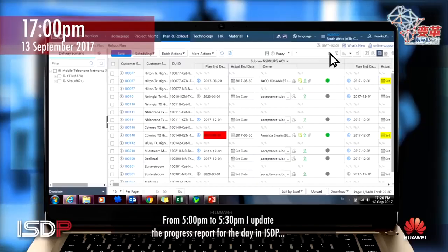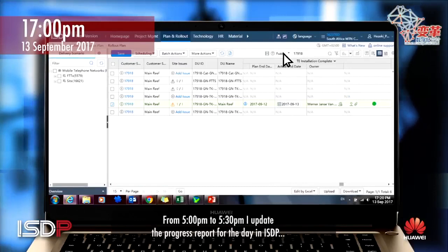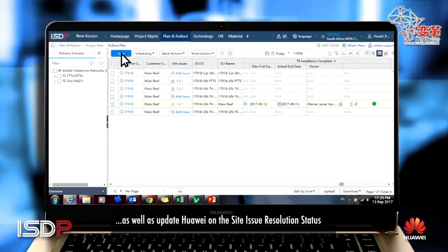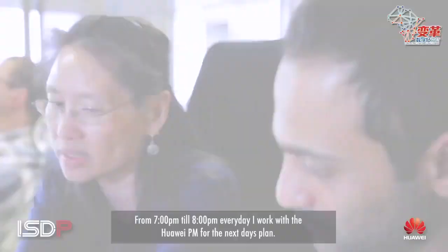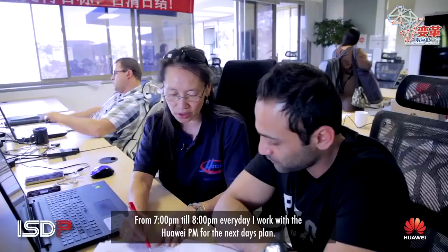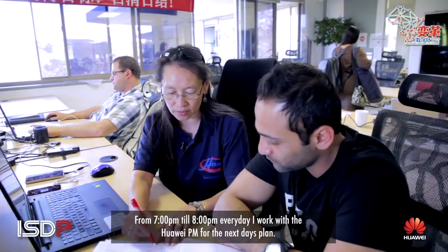From 5 p.m. to 5:30 p.m., I update the progress report for the day in ISDP, as well as update Huawei on the site issue resolution status. From 7 p.m. to 8 p.m. every day, I work with the Huawei PM for the next day's plan.